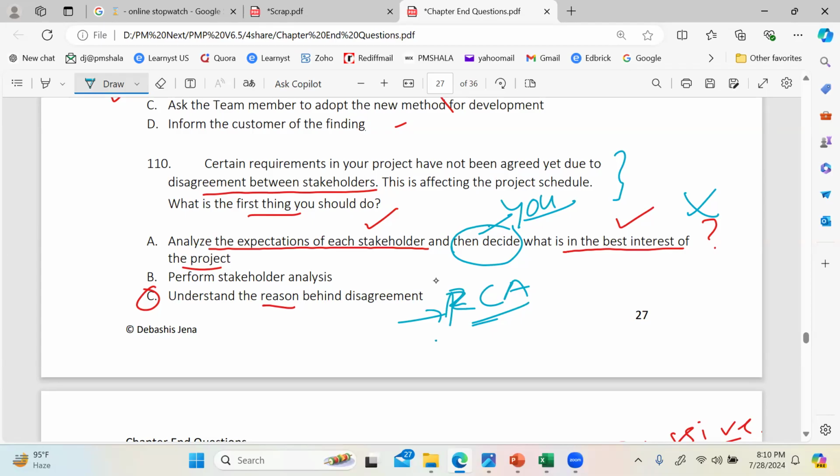And then he will share with the stakeholders. Don't share the root cause analysis. Next, explore options. So the steps of problem solving would be: do RCA. Then after that, you explore alternative ways to solve it. After you think of 2-3 alternatives, you pick the best one. Then go to the stakeholders: okay, here is a way we can address it. That would be the sequence.